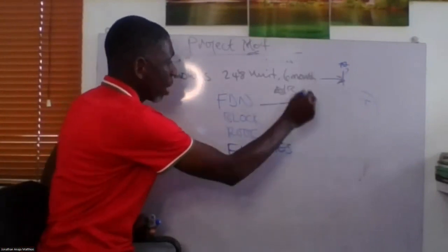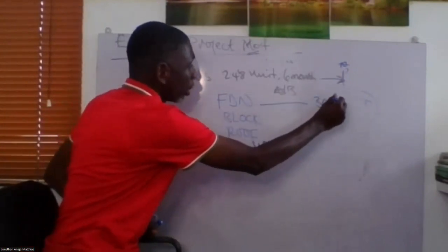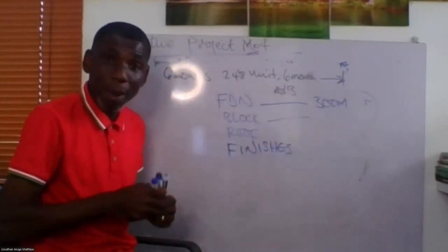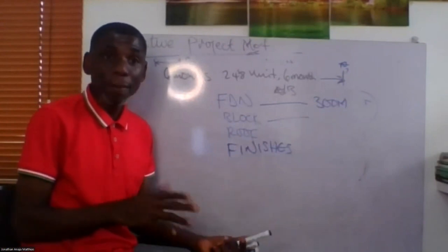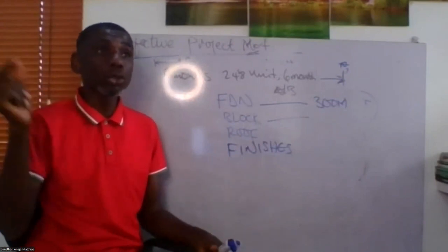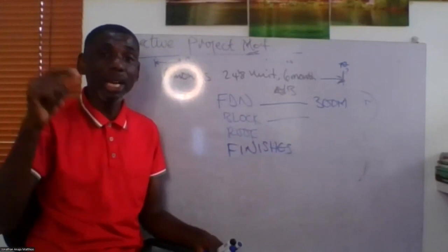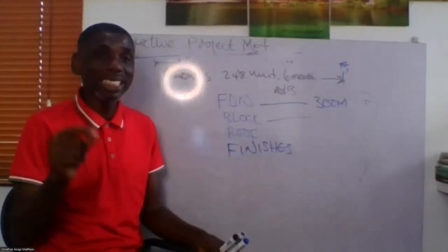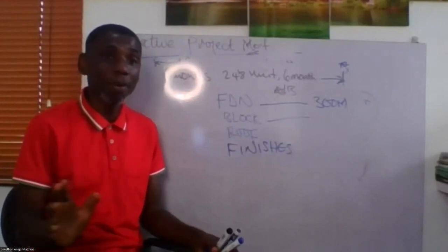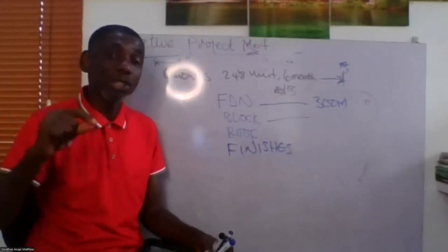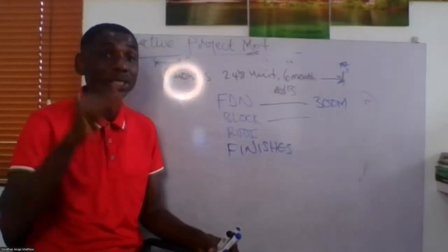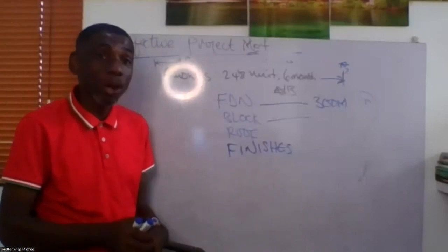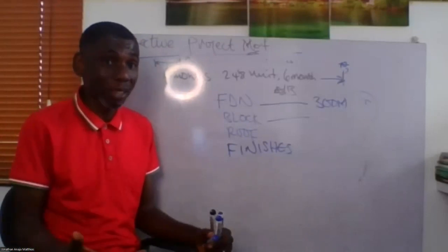I can say that, for example, I spent maybe 300 million here. That's from my record. I can go back to my record after my closeout meeting. Yesterday, I told us that you don't finish a project without a proper closeout. During the proper closeout, one of the things you should do is to update your issue log before you pack it. You can also update your change requests. Any change that was made, I have those records. So that's why it's easy for me to analogously give a rough estimate.